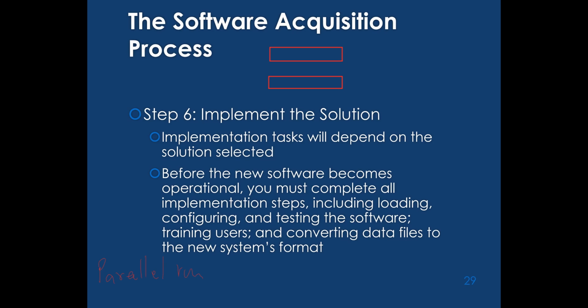Some companies decide to run it as a cutover: this is the old system, and on the designated date you run the new system straight away. Some companies would like to run the system in phases: in phase 1 you still run the old system, and then you start using the new system, and when you have run the new system for a while, you cut off the old system and run only the new system. So this is the method of how you are going to use the new system. I will talk about it in detail when we reach that part.